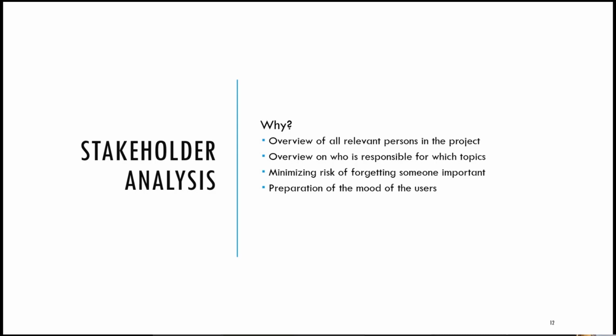I had two experiences in the past. Forgetting the data protection team can mean a big delay of a project, especially when we're talking about data projects, because it has to go on pause while analyzing if the project can be done. They have to identify if the process data are allowed to be shown on the report for the department, or if there's anything forbidden to see. And forgetting, in Germany, the works council once meant the cancellation of the project, just for political reasons. Because the bigger the project is, the more business politics plays a role.